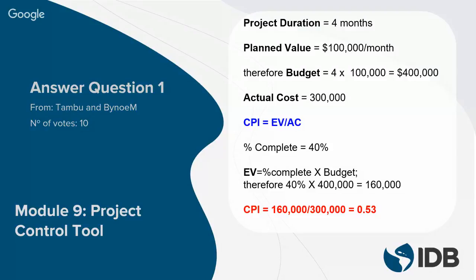Excellent. Thank you, Cherise. And what does this indicator now tell us? It's 0.5, but what does that mean? Are we doing good, or what? So it influences the performance of the cost of your project. How are you spending? It gives you an indication if you're ahead of budget or if you're behind budget.